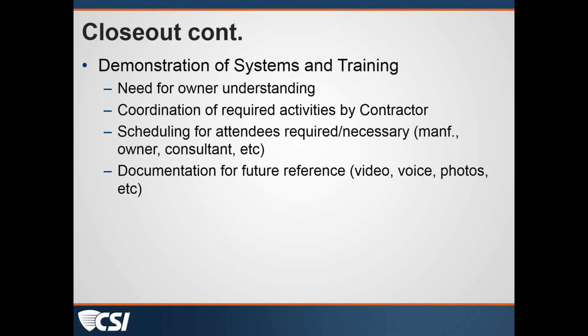And "record drawings," this is the set of documents where we're incorporating the contractor's markups that we turn over to the owner. If you define them clearly in your documents, that might help you stay out of some issues. I frankly have not been made aware of any major legal issues or cases over the term record drawings versus as-built, but it's better to be safe than sorry.